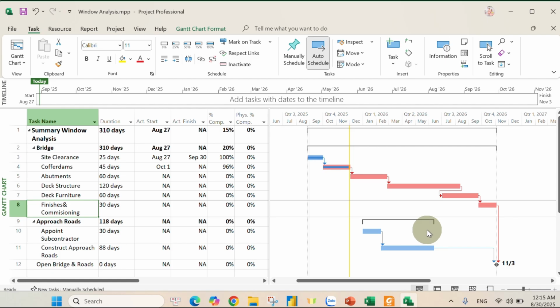But it depends on the contract. If the contract specifies that only the principal will be entitled to the float, in that case the contractor cannot use the float. In this case, if the employer instructs another task that affects this work, making it a critical path, the contractor has to pay for the one they had delayed.